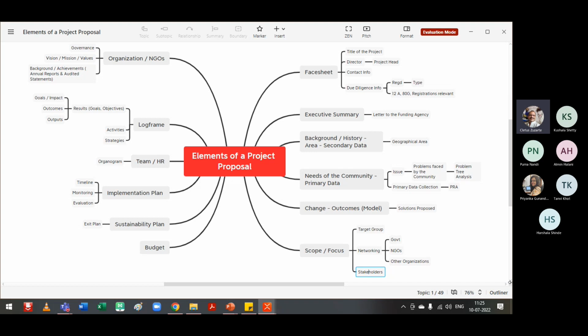Again, when you're submitting your budget for the first year, you would give a detailed budget for the first year, and you would give a consolidated budget for the second and the third year with only key important expenses. That way the funding agency will know, along with the incremental 10% you're looking at, what the project is. Suppose the project is around 20 lakhs or whatever it is, with 10% in the second year, they know exactly whether it's going to go up to a crore.